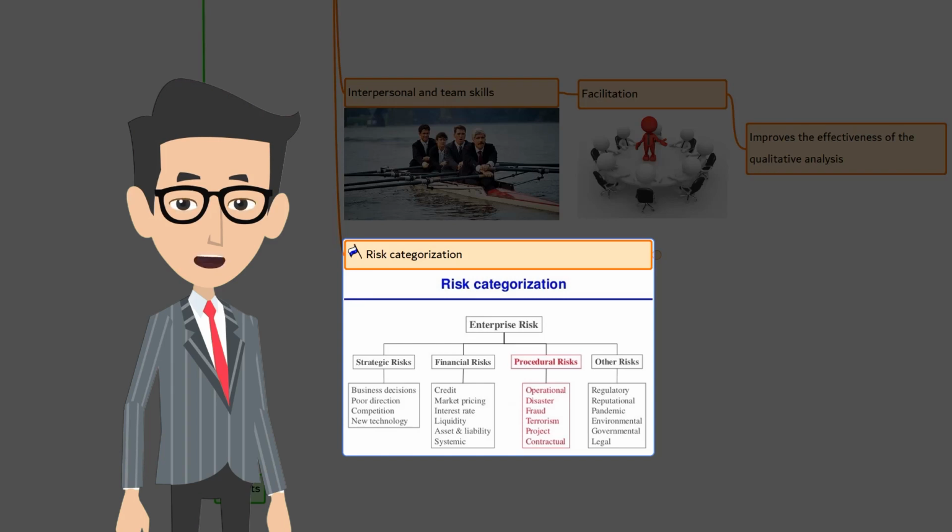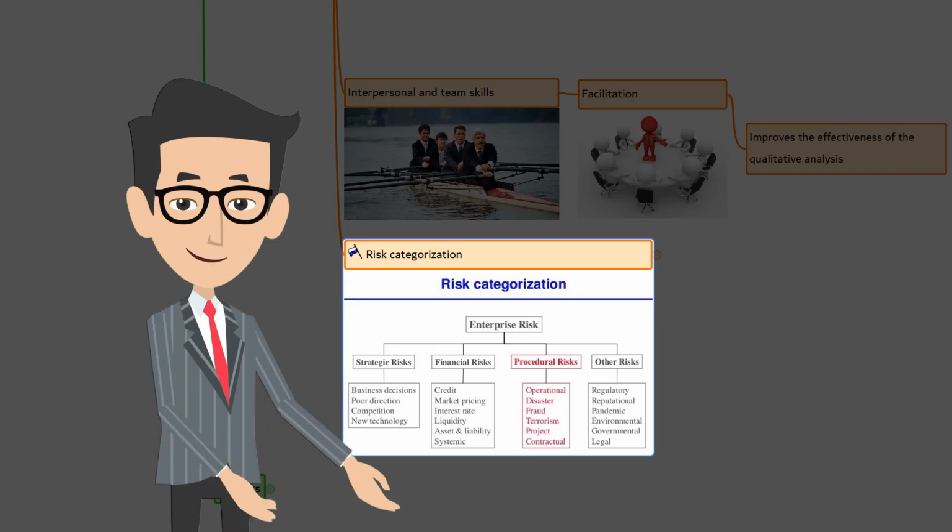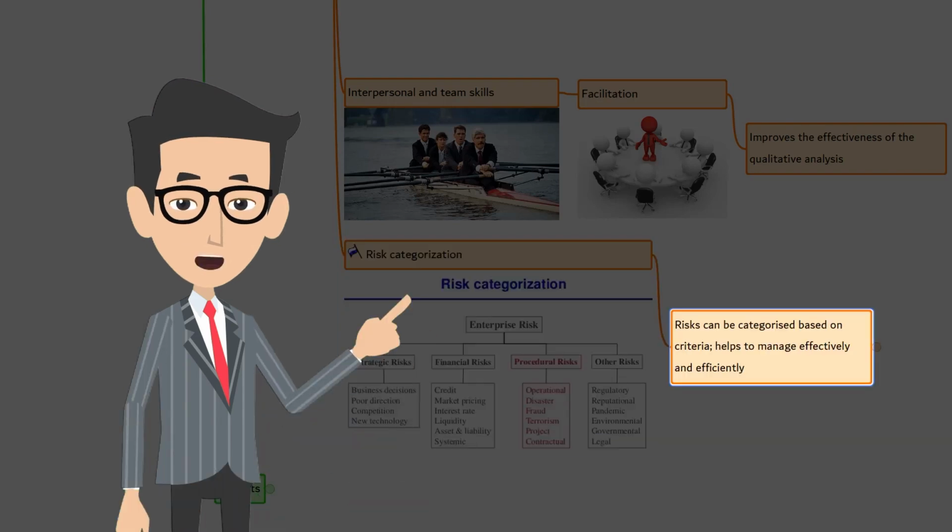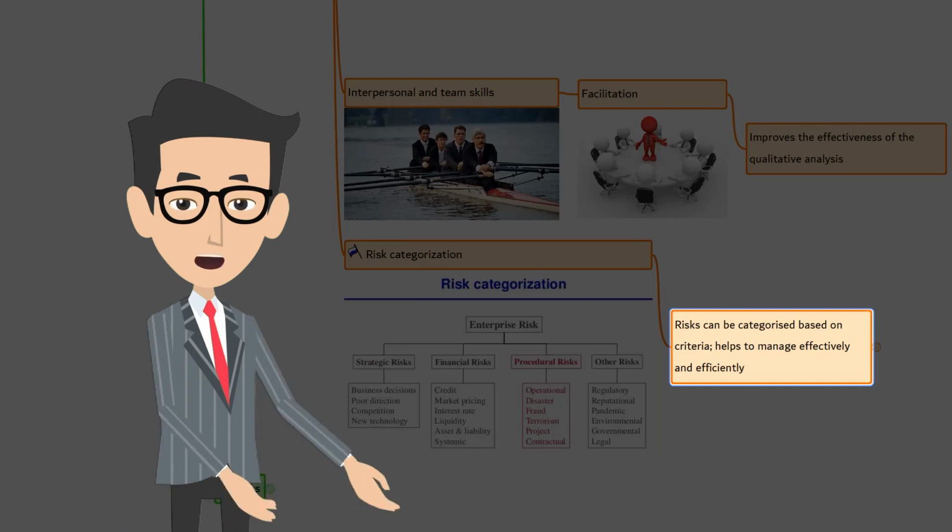Remember, we don't call it RBS because RBS refers to, yes, you are right, resource breakdown structure, not risk breakdown structure. This grouping helps to develop a generic risk response plan to address a group of related risks. When risks are grouped by root cause, addressing one root cause obviously will solve multiple risks.